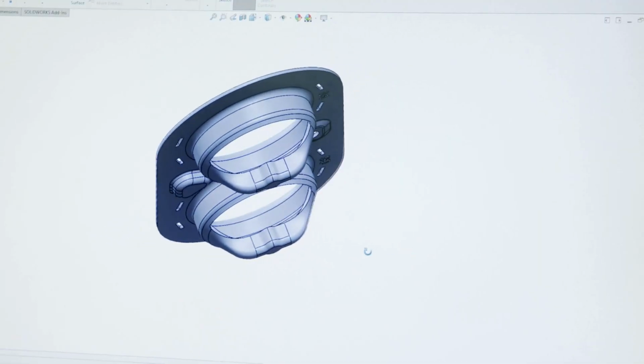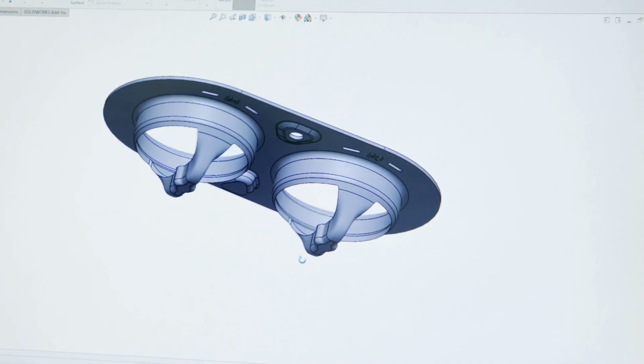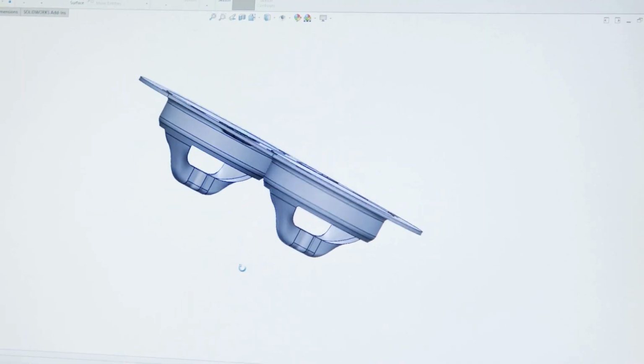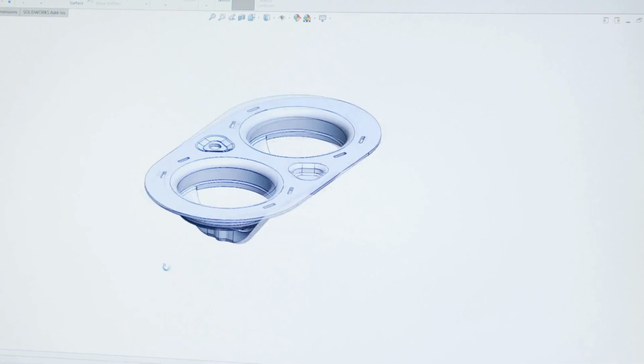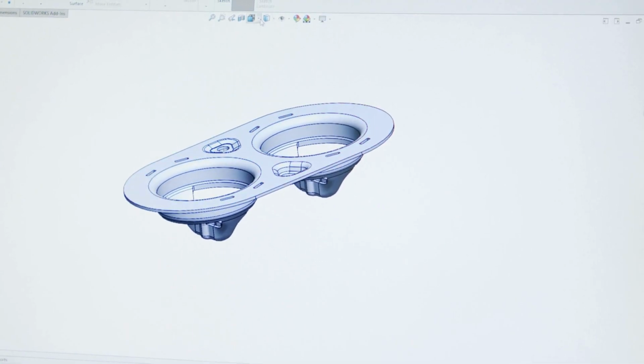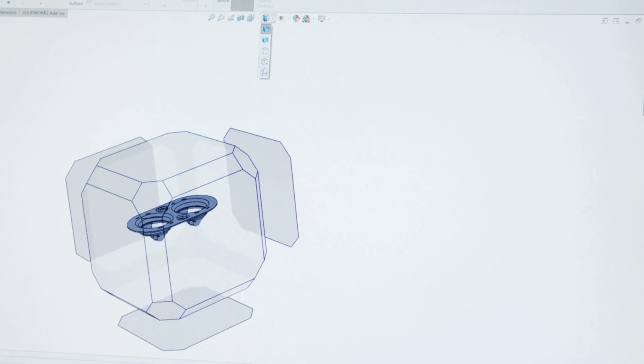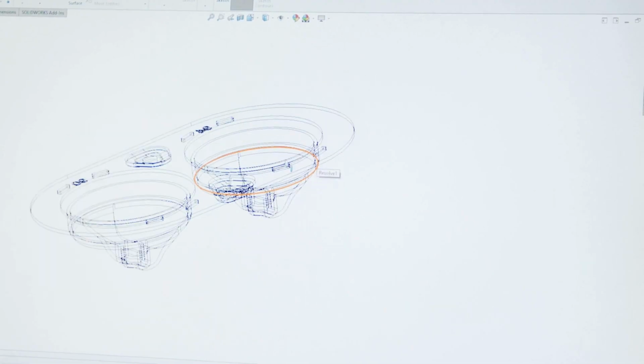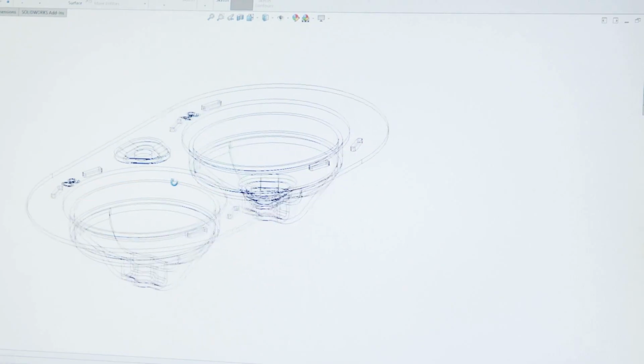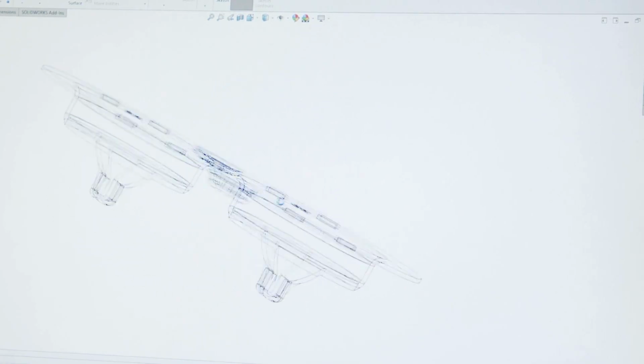The fifth one is engineering support. Products very rarely stay the same. Most of them evolve based on customer feedback. Your contract should outline how the supplier supports changes in the design. Some of the questions that need to be answered are, will they offer DFM? Will they update tooling? Will they update any technical drawings and share those with you? And also, who is responsible for approving change requests? This section should answer all of these questions.